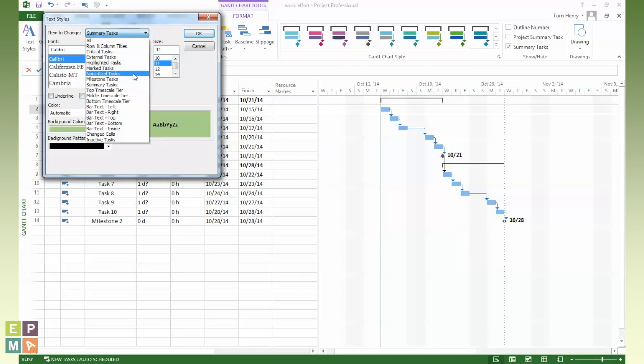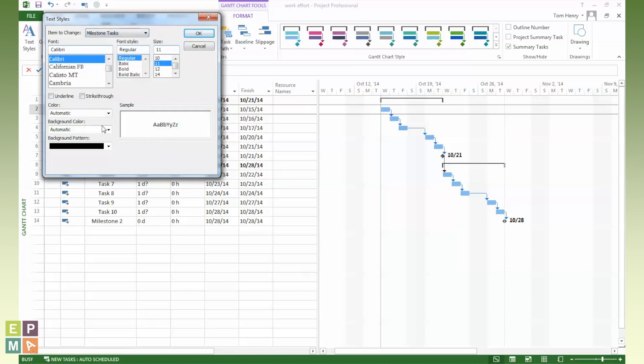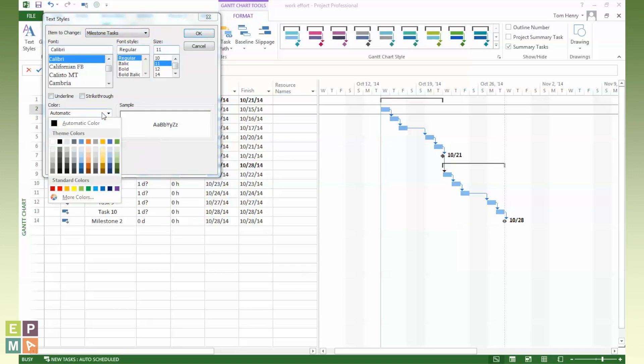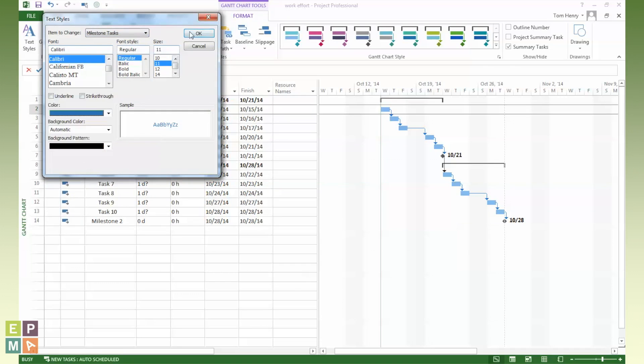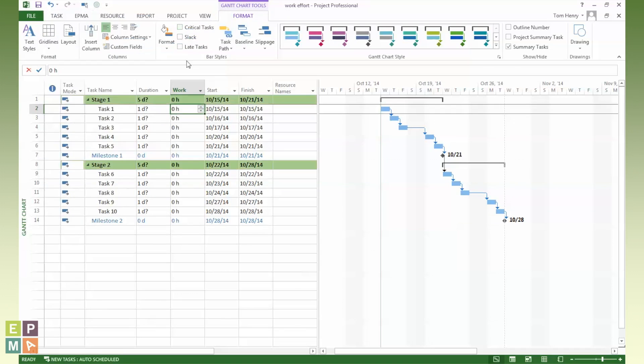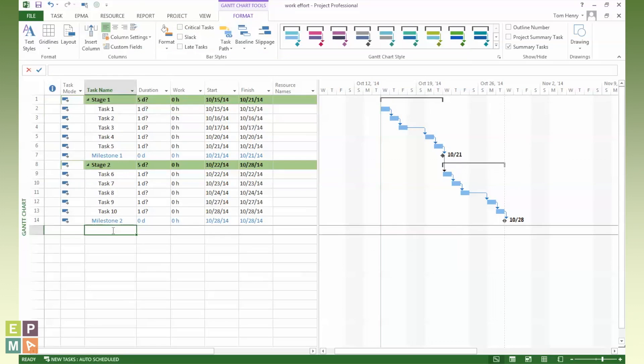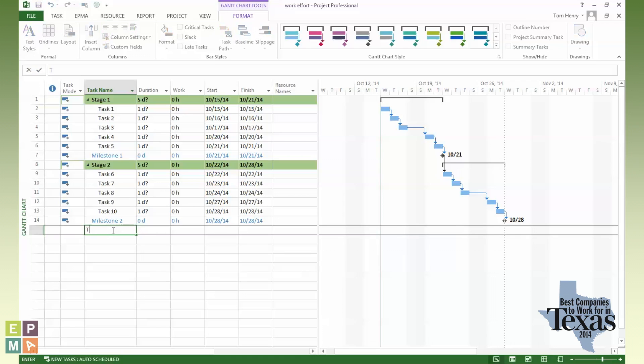And also for my milestones, I generally make the foreground color of those, this dark blue here. I could go slightly darker, but that'll do for now. So green summary tasks, a milestone. So every time I create a new summary task or a milestone, you'll see that it'll instantly turn to that color. That's the text styles.